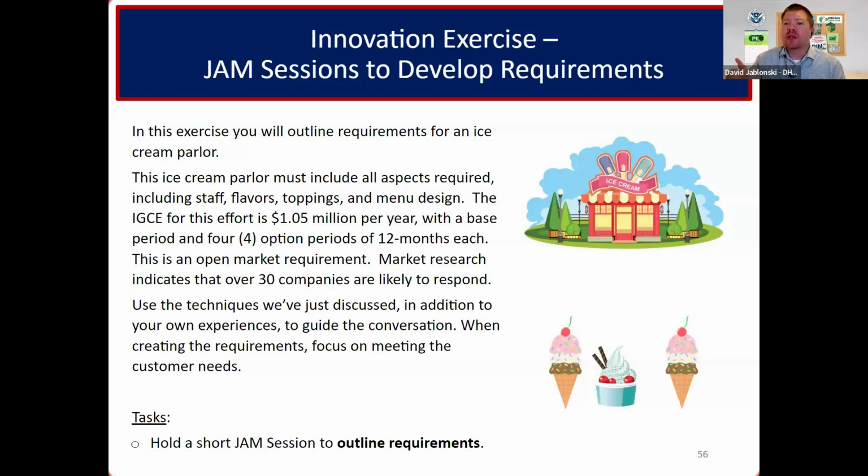The other type of down select we call a firm down select, where you're kicking someone out. Now, the downside of a firm down select is that vendors can ask for a debriefing. They can potentially protest as well because they're being kicked out, whereas with an advisory down select, you cannot. Not limiting, Peter. It's a way of getting down from a bigger pool to a smaller pool. And so you're not limiting the competition. You actually want a lot of people in there.